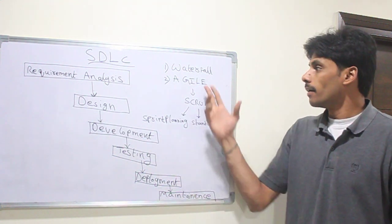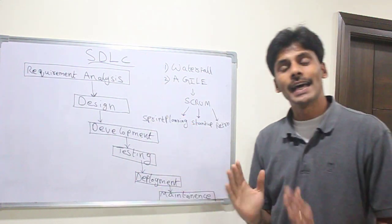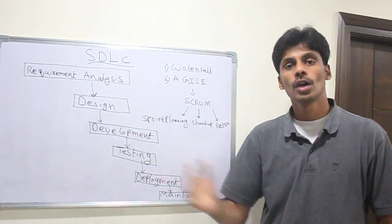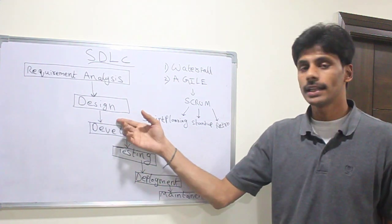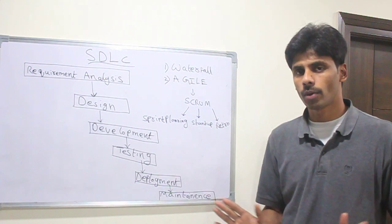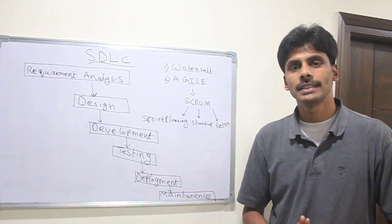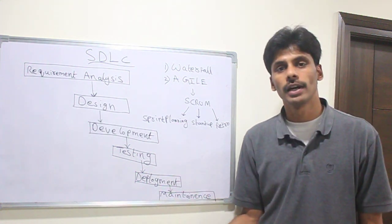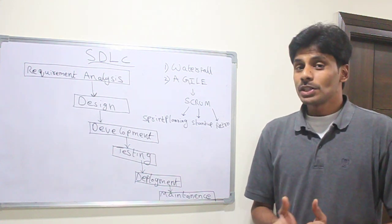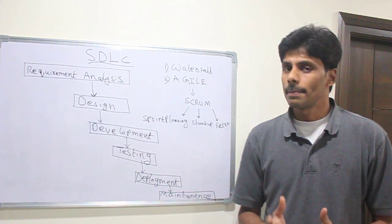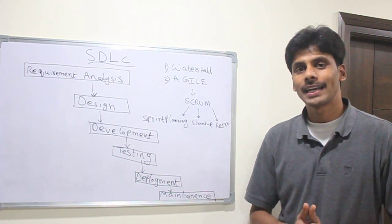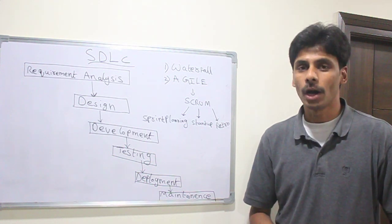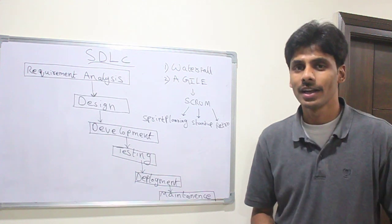In the waterfall approach, each of these phases is done for the entire product at once. The business analyst does the requirement analysis for the entire product, and then similarly the design, development, and all phases occur once, and the entire product is delivered at the end. One huge disadvantage is that we don't get instant feedback from clients. We have to wait for the entire product to be delivered. Also, the technologies and frameworks being used can become outdated by the time the product is delivered.